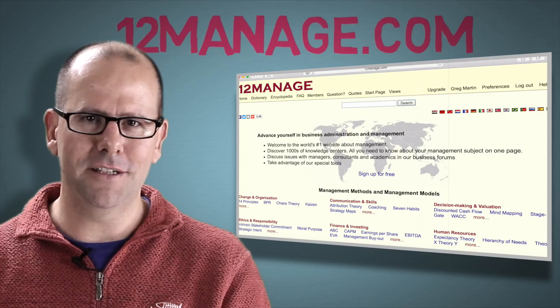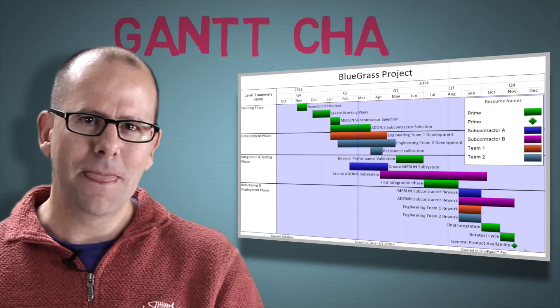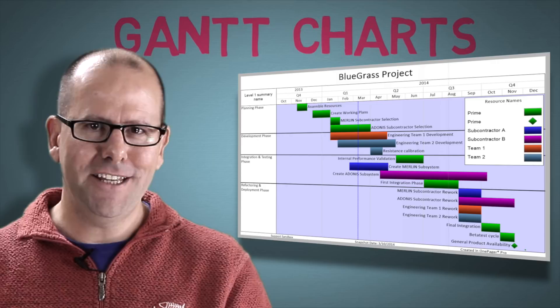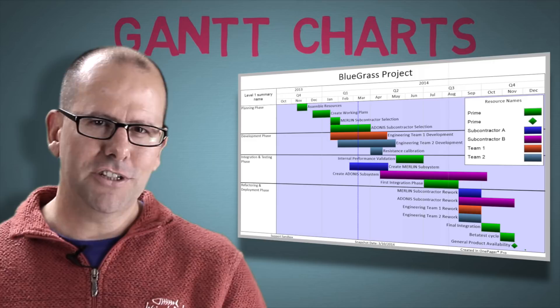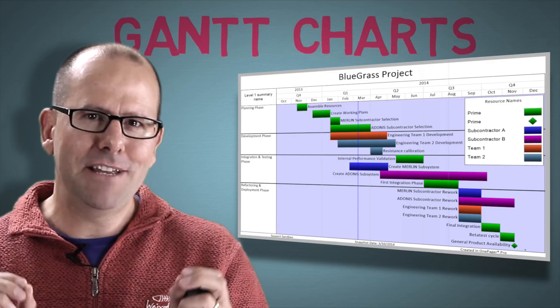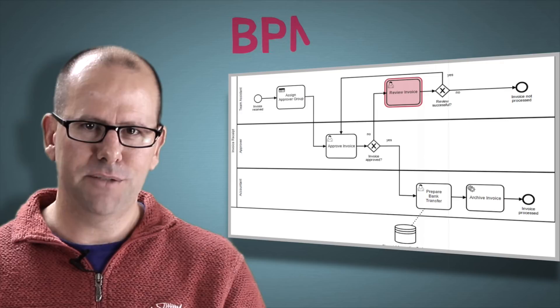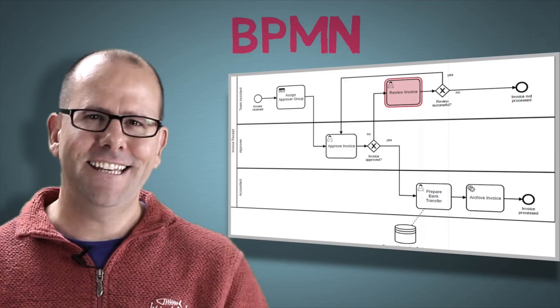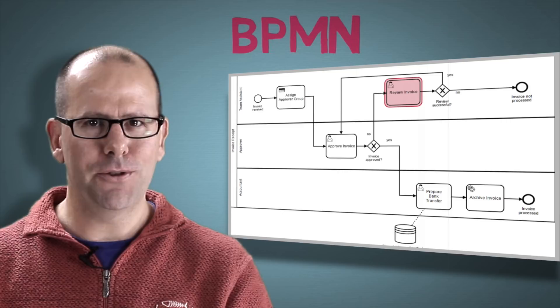Next, Gantt charts. Gantt charts are an excellent way to visualize the various elements within a project, giving each element its respective start and end time within a timeline. Importantly, you can include dependencies — so one element can't start until another is finished. Gantt charts can be used to plan projects and to monitor progress as they unfold. They're extremely easy to understand, so everyone involved knows what's going on, and they're easy to make — simply use Microsoft Excel, for example. Next, business process model and notation. This is a way to visualize complex processes using standard icons representing different kinds of elements. It takes a little time to learn, but it is worth it, and once you know how, you'll use it again and again. A terrific online resource for creating these is Lucidchart — free, easy to use, and I'll put a link in the description below.